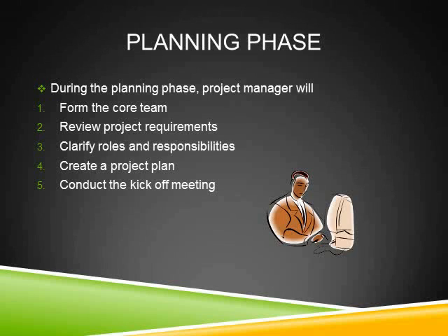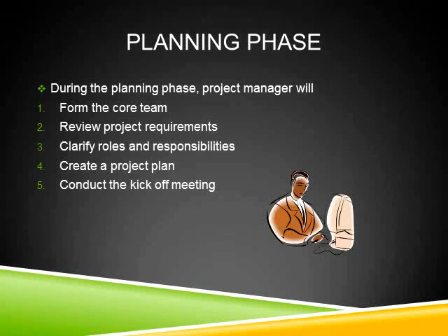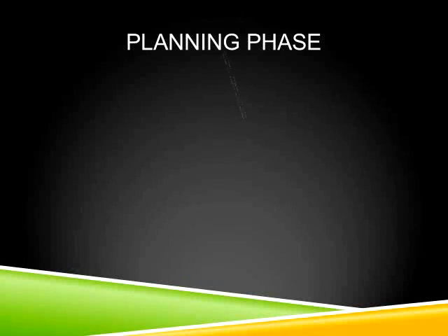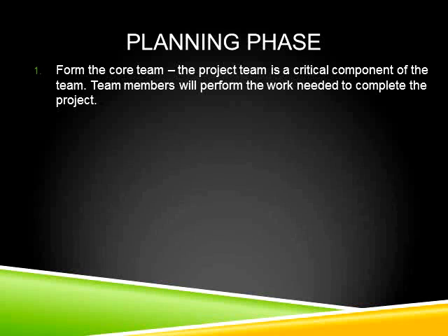During the planning phase, there are five elements: forming the core team, reviewing the project requirements, clarifying the responsibilities and roles, creating the project plan, and conducting the kickoff meeting. Basically, the first thing is creating the team, which is of vital, critical importance, so the project manager really needs to look at his team members.